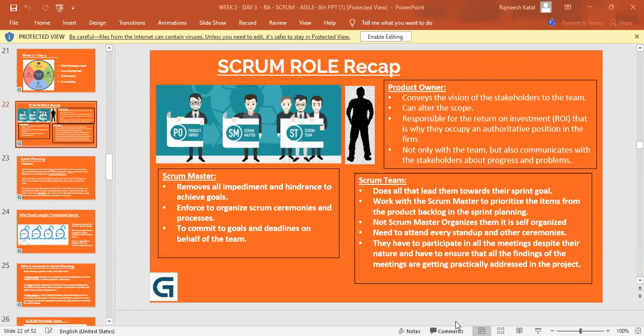That is what we have to work on, and that is how they plan. Again, in the course of the sprint, if there is any change or variation, and as you rightly mentioned, if it is small and doable, and won't cost time, money, or resources, then we can work on it after consulting the Scrum Master and product owner.